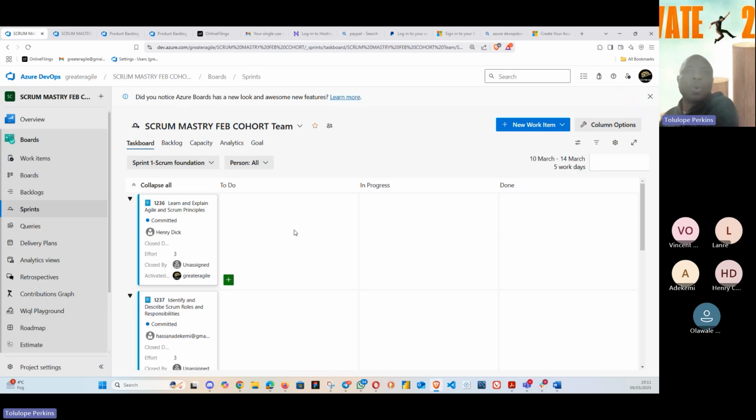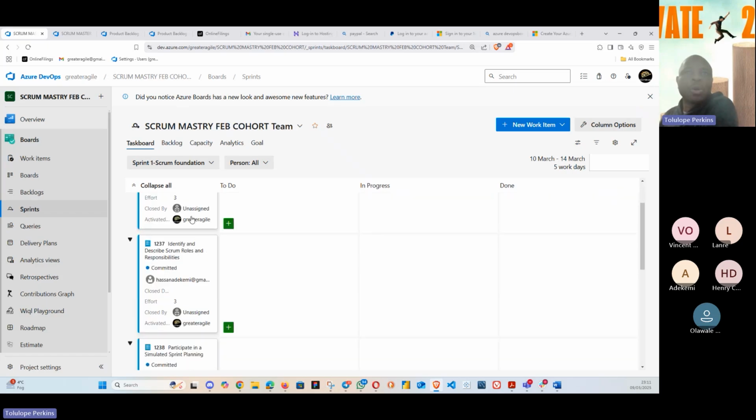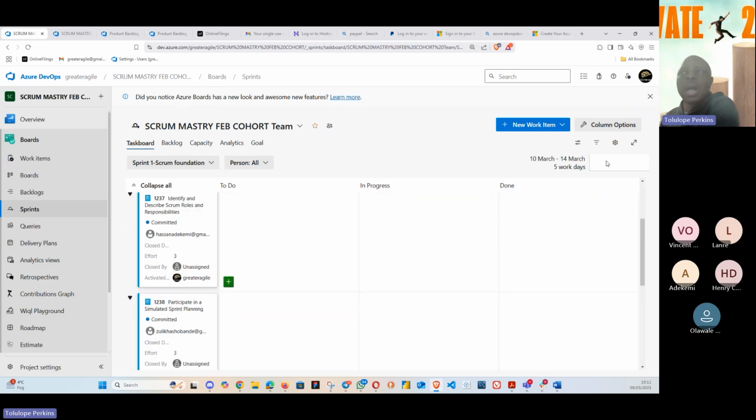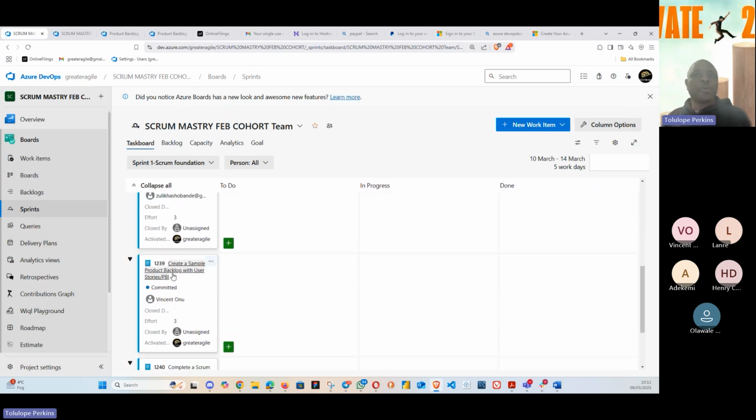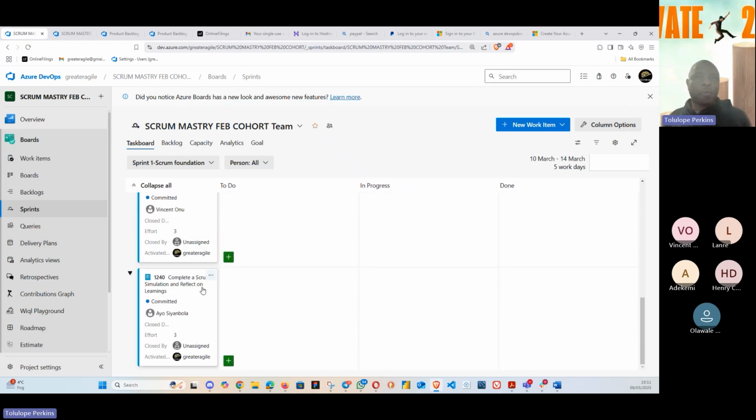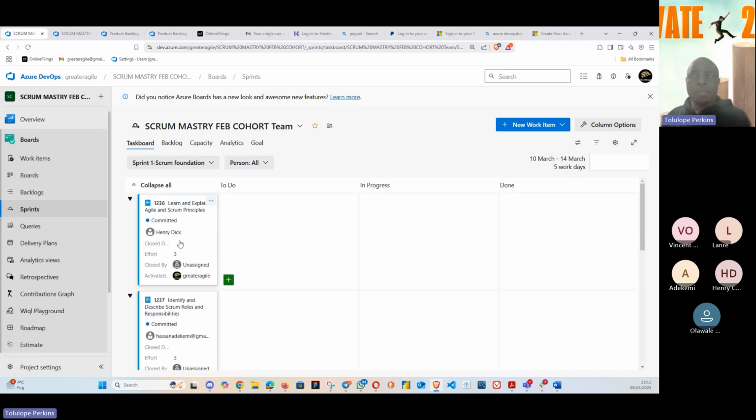And I want us to have discussion, if possible, on which day we want to close. So I want us to be closing one per day so that we have a very good burndown chart. So if you close one on Monday, close one on Tuesday, close one on Thursday, close one on Friday, then we'll come and have our sprint review on Saturday.